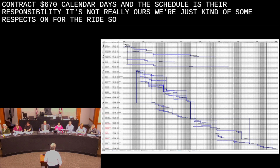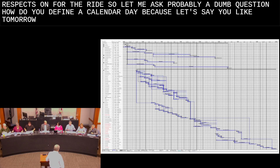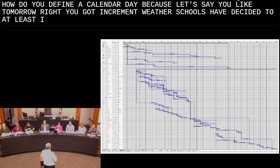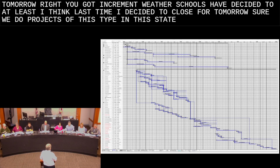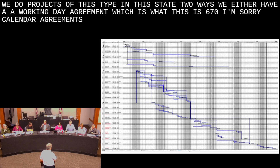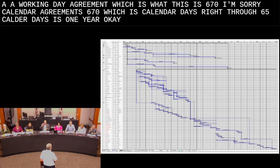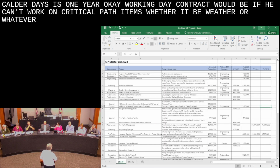So let me ask probably a dumb question. How do you define a calendar day? Let's say tomorrow you have inclement weather, and schools have decided to close. We do projects of this type in this state two ways. We either have a working day agreement, or a calendar day agreement, which is what this is, 670 calendar days. 365 calendar days is 1 year. A working day contract would be if he can't work on critical path items, whether because of weather or whatever, he isn't charged a day.